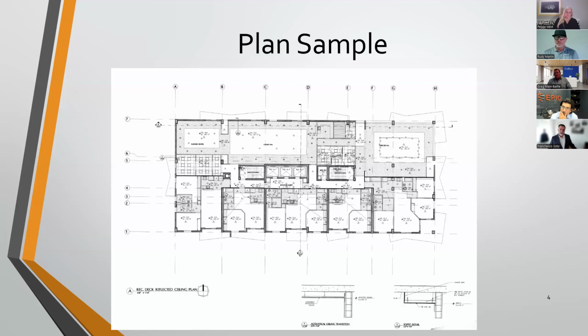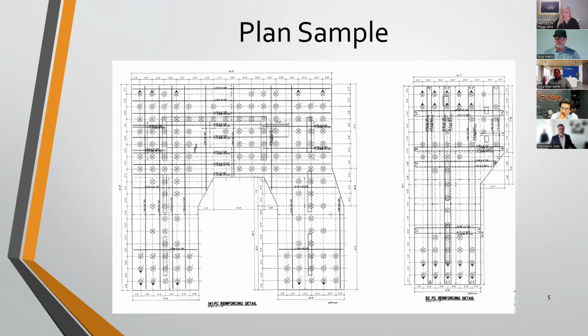So in the bidding phase, when we go out to bid and put an RFP out to the contracting community for a deck renovation or anything of that sort, that process takes about 6 to 8 weeks, depending on the size of the deck and complexity of the assignment. Now, once the initial numbers come back, they typically come back with a substantial amount of questions and clarifications that have to be communicated through the owner's rep to the engineer.